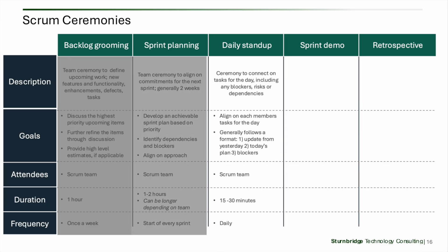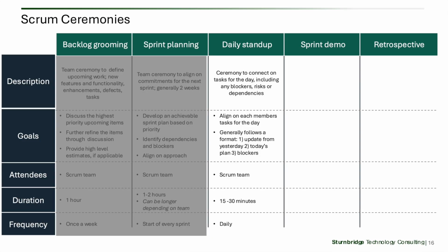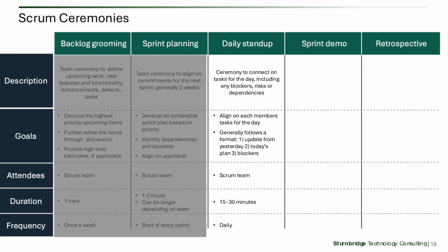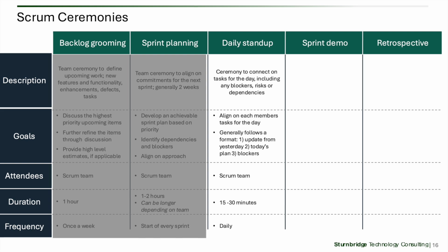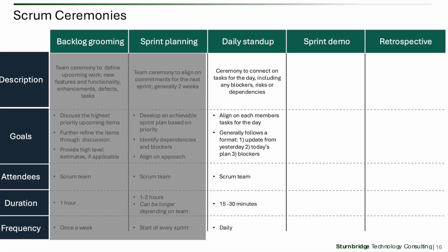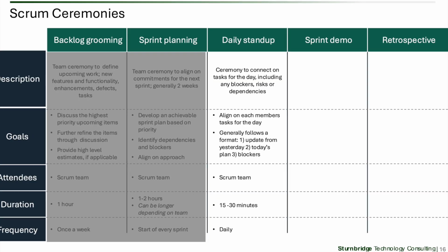The daily stand-up. This is a daily ceremony, as the name states, to connect on tasks for the day. This includes any blockers, risks, or dependencies in addition to those tasks. During the daily, each member gives a quick update. It usually consists of the format of, first, what's your update from yesterday? Second, what's today's plan? And third, any blockers.